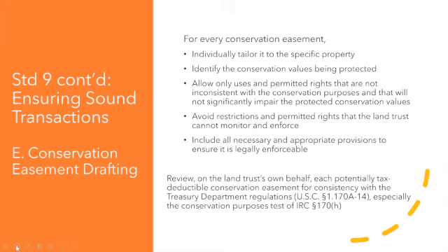Yeah, just very briefly, in Massachusetts, there's a regulatory requirement that the state has to review and sign off on every conservation restriction, whether or not the landowner is claiming any tax deduction. It's not about the tax deductibility.